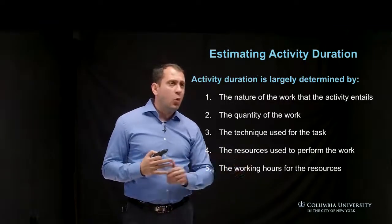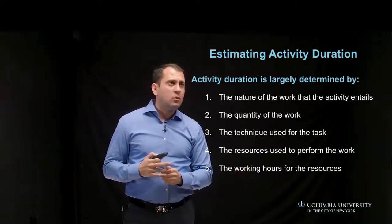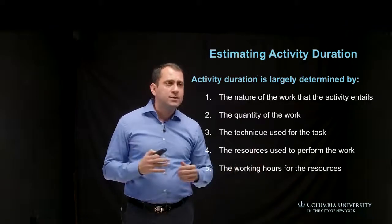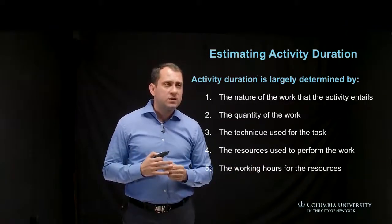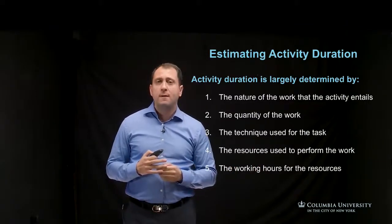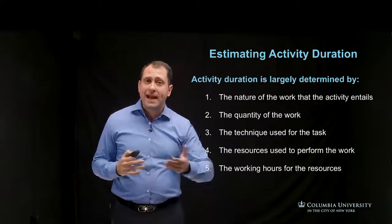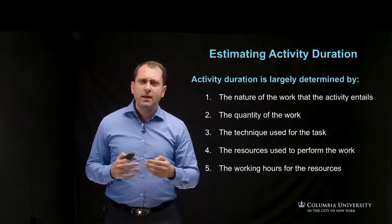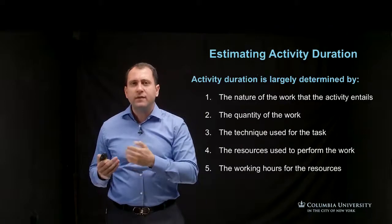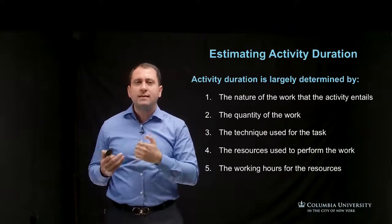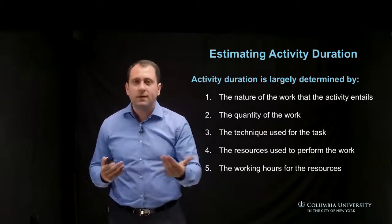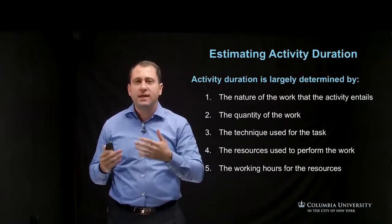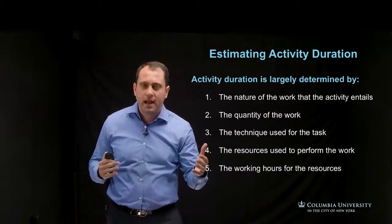The last point I want to highlight is the working hours for the resources. For example, a construction task will be finished earlier if it uses a 10-hour shift per day instead of just an 8-hour shift per day.